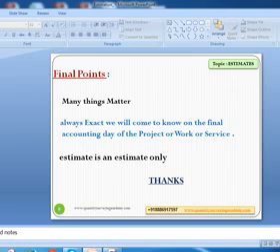Now, as I was discussing, in an estimate many things matter. That is the reason I have used the words: things which are tangible, which are certain, which are in our control, and some things which are not in our control. Sometimes material owners' strikes will be there, like sand truck strikes, and government's control on the sand. So we don't know what decisions are going to come in coming days, whether from government organizations or from our vendors. That is the reason many things matter.